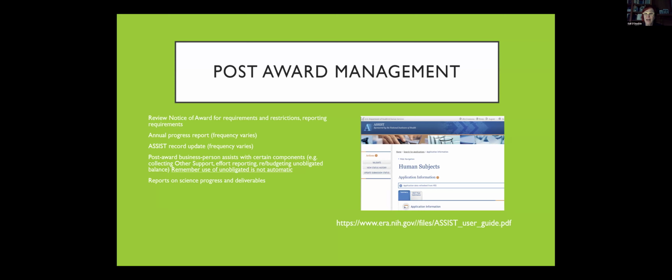So what normally happens is you know you have money for the next year, but you can't use all of it because you haven't gotten the carryover approved. So you may be at risk for a certain amount, and you may have to set up some at-risk accounts. But in general, they're good for it, but your institution has to be experienced enough to know that.